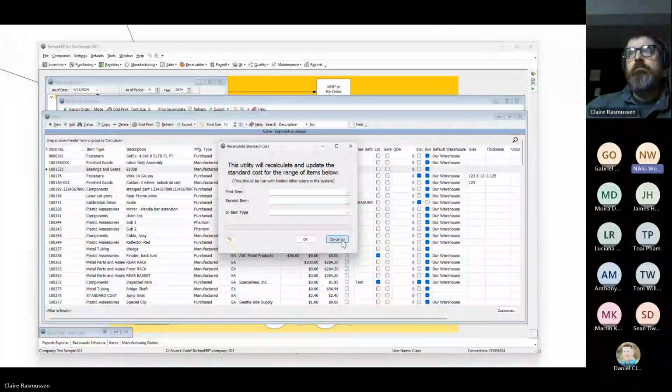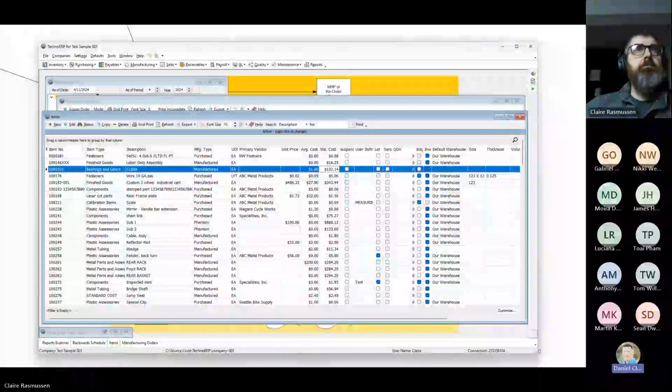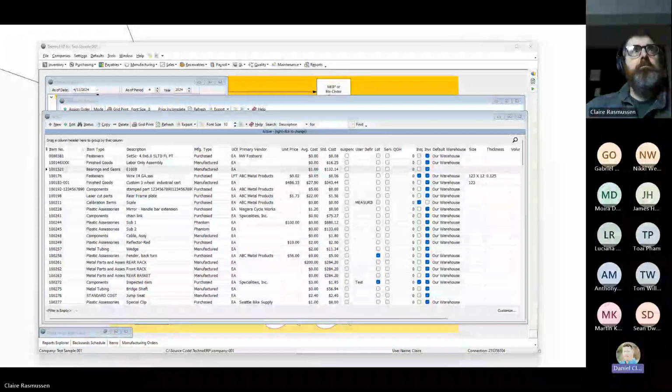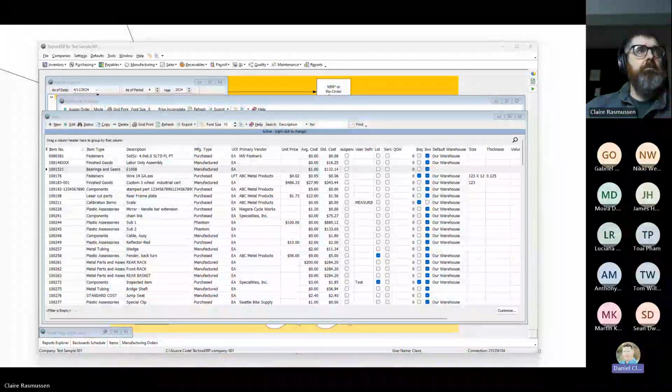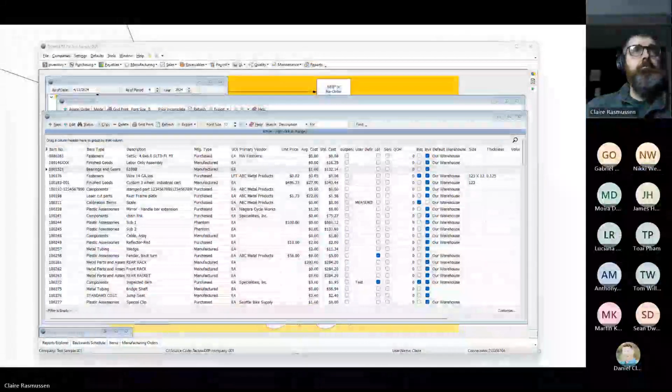Awesome. Thank you. One cool trick, Nikki, is if you run a job cost report from the item screen versus the work order screen: the work order screen just gives you that work order, but from the item screen, it gives you like the last 10 jobs, I think. So you can kind of see them all side by side. Awesome. Thanks.